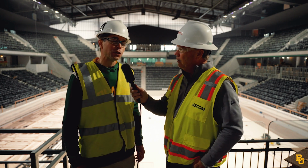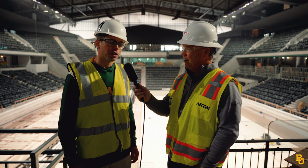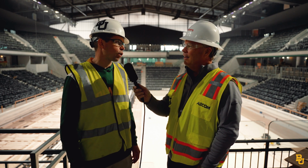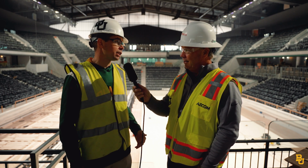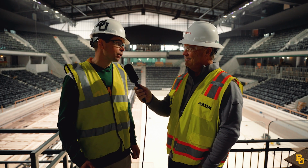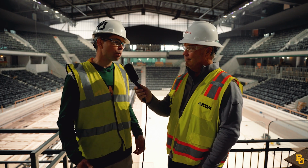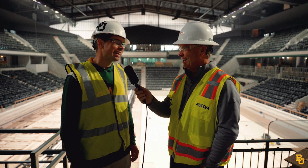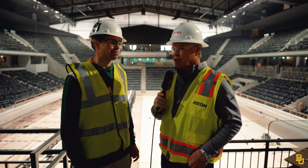Gotcha. And some other furniture, so to speak, is scheduled to be here in the next couple of weeks. It is. So we need our certificates of occupancy to start bringing equipment that's not affixed to the building into the facility. Working with the city of Waco, the inspectors, again, they've been great partners, really helped us meet every deadline thus far. But we do have kitchen equipment, we have the team benches, we have the chairs that the scorers sit at, media tables. So there's just a long list of items that are being delivered. Everything is intended to be on schedule, but we really can't start taking delivery of those things till about mid-December. So we're using every day that we've got allowed and working with the city on things like that. Gotcha. So that's about a month away then.